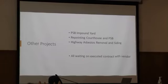Joe could just speak on the status of those contracts, the ones you guys still have left to go out, Joe? Impound is out. The other two are going out this week. What were you asking, Dick? What's that total figure? 17,100, what did we get for that one? 86, I think. 17, 86, and 180, right? It's still under the total. For highway, it's coming out of the capital project for highway. We budgeted 400 grand for this one, and the bids came in way low. So that's half price. Good.